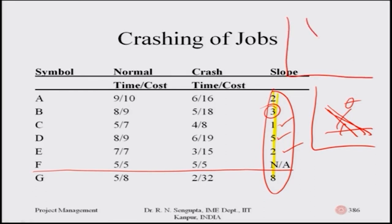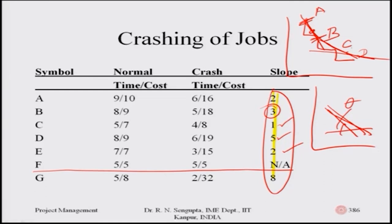The non-linear cost curve is approximated using tangent lines. The portion from A to B is replaced by a straight line tangent to the curve at that interval. Similarly, a tangent from B to C replaces that portion of the curve, and from C to D another tangent is used. All corresponding slopes for AB, BC, and CD replace the respective portions of the cost structure.